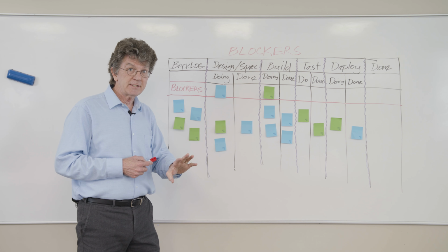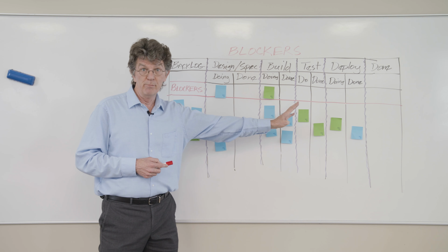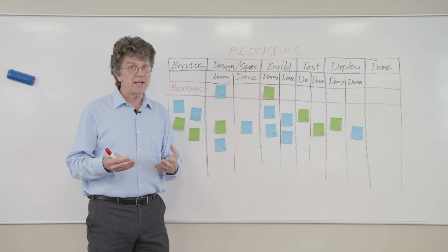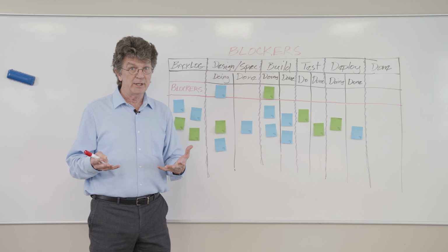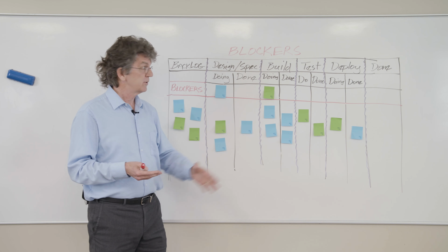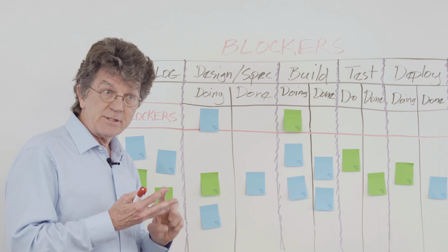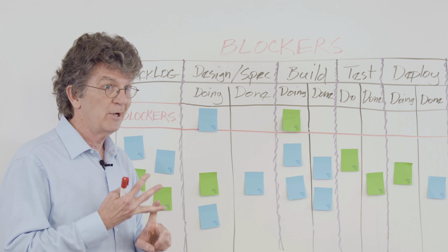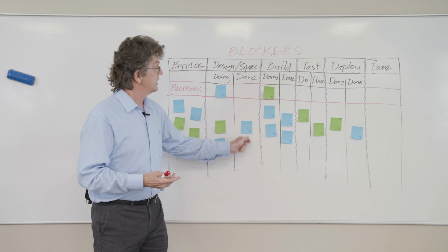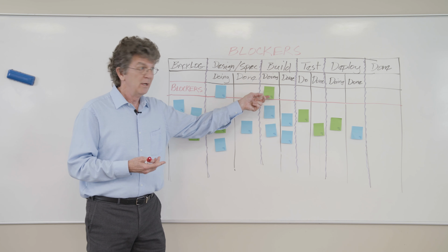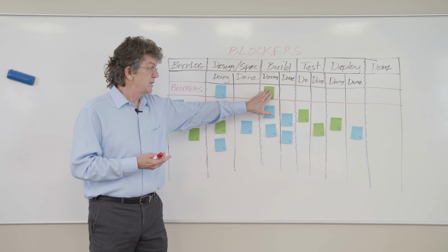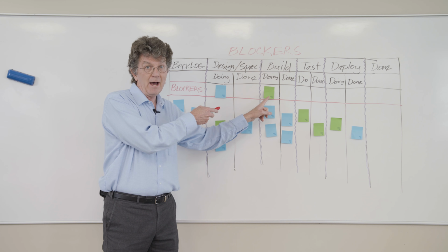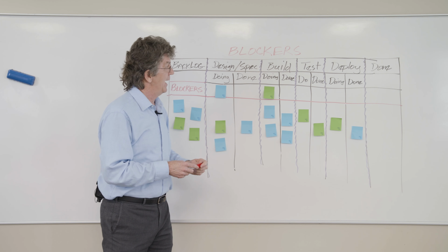If you have your daily stand-ups at your Kanban board, then when it comes to that 3rd question in our daily stand-up, do I have any impediments? Not only do I speak to them, they're there. It's a Scrum Master or Agile Team Facilitator's job to destroy all impediments, right? When I put a ticket up into the blockers column, I just told my iteration manager, Scrum Master, that here's something you can be doing to help me out, if that's appropriate.